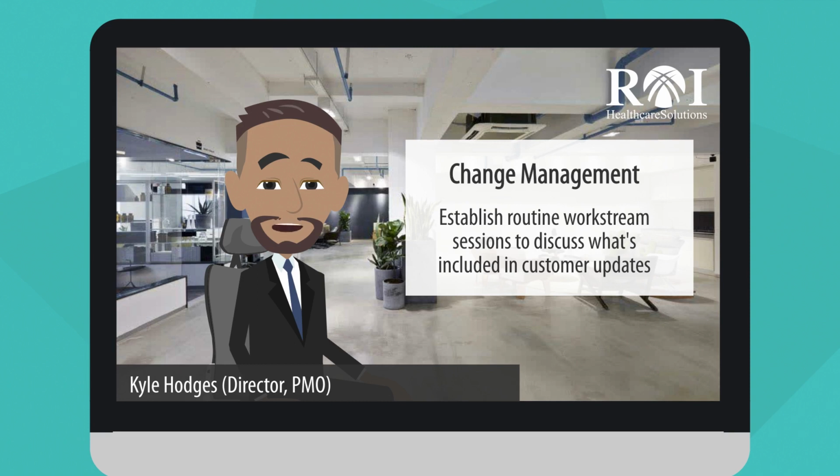From a timing standpoint, we typically find that it's best to sync up with when the release notes are available. Normally that's approximately 2 weeks out from when the CU is scheduled. So we look to put something on that week to 2 weeks out time period to make sure everyone is apprised of what's coming in that CU and if there's any impacts for what we're doing within the project itself, and in the long haul for the team to evaluate if there are any impacts to their operational processes.